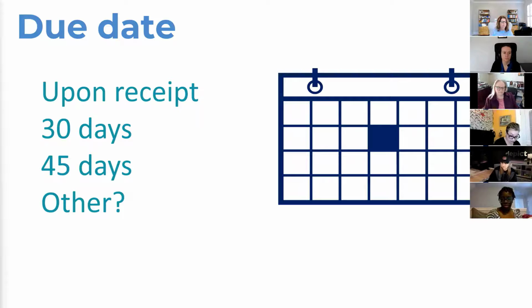So this process of setting expectations around invoices works really well for us. We put that in our SOW. So we have the total amount of this project is X amount. The invoice schedule is below, and we have an invoice table with the dates. We book those dates in our project management system, and we bill accordingly.